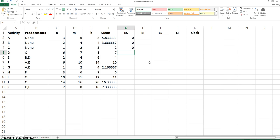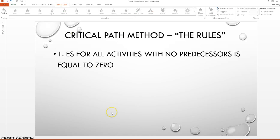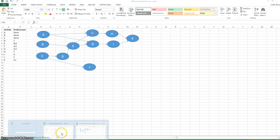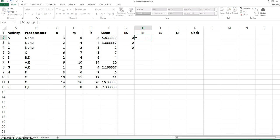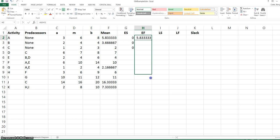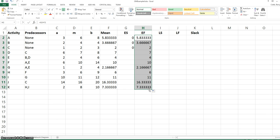There are three activities with no predecessors in this project. The second rule is that the earliest finish time is equal to the earliest start time plus the mean activity time. This earliest finish time will be calculated the same way for all activities, so this formula can be copied down throughout the remainder of the spreadsheet. All of the times won't be correct until the earliest start times are filled in, but we can go ahead and set up the formula.